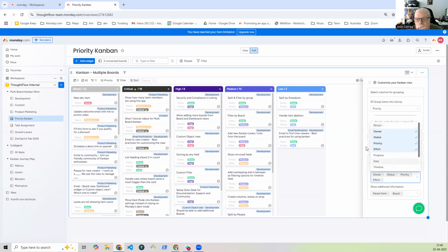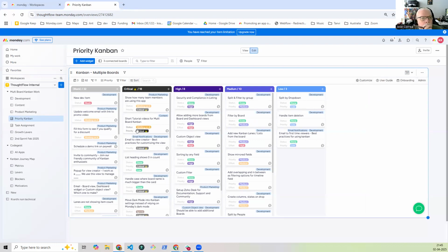So based on the effort, and typically also based on something being important, like we notice that customers are asking more, or if we feel that if we build this, there is a good chance that we can address more use cases, right? Based on that, we move things from the blank priority to one of these: critical, high, medium, low, right? This is something that I do on a weekend. It's more like a solo activity. I don't involve others, and then get a sense of prioritization, right?